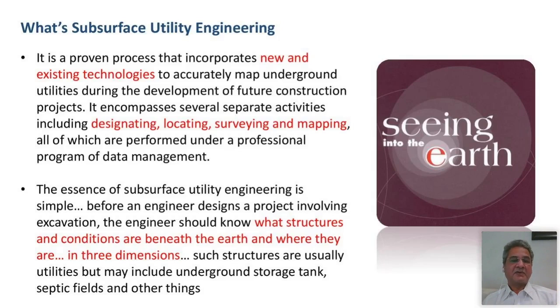The essence of subsurface utility engineering is simple. Before an engineer designs a project involving excavation, the engineer should know what structures and conditions are beneath the earth and where they are in 3 dimensions. Such structures are usually utilities, but may include underground storage tanks, septic fields, and other things.